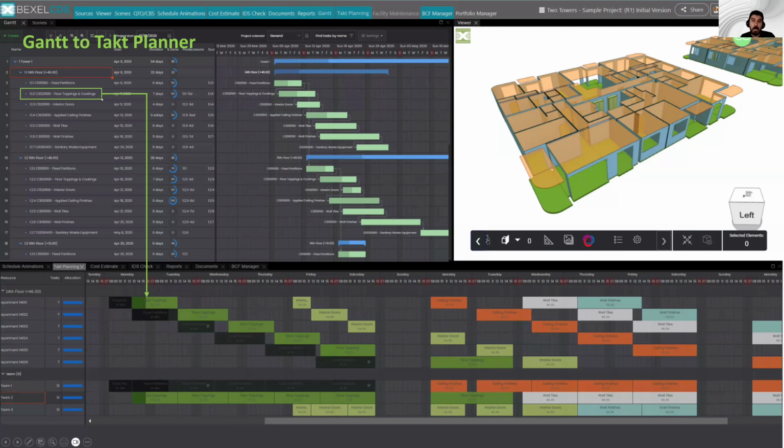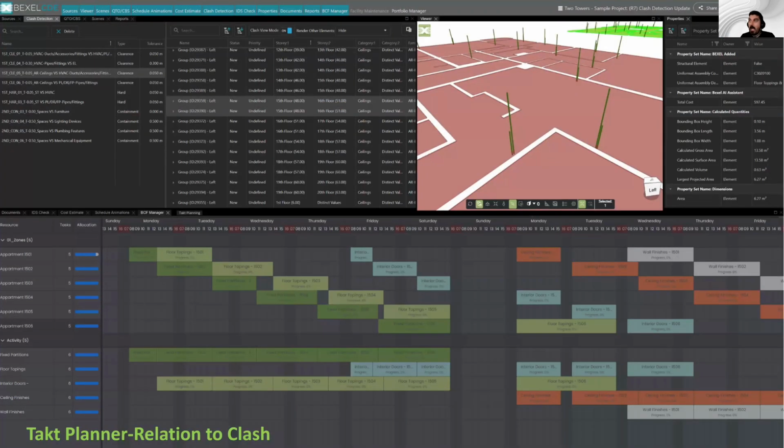So as I said, the final goal is that for every task and subtask you have, let's say, a green light or a red light. You simply have a color. Okay, this task is ready for execution. There are no active issues. There is no missing documentation that is not confirmed. There are no pending changes, and so on. If there are certain clashes, I'm going to know if those clashes are solved, if they are high priority or low priority, or maybe they're not solved, but somebody gave me the written solution of what I have to do in order to avoid problems in the future.